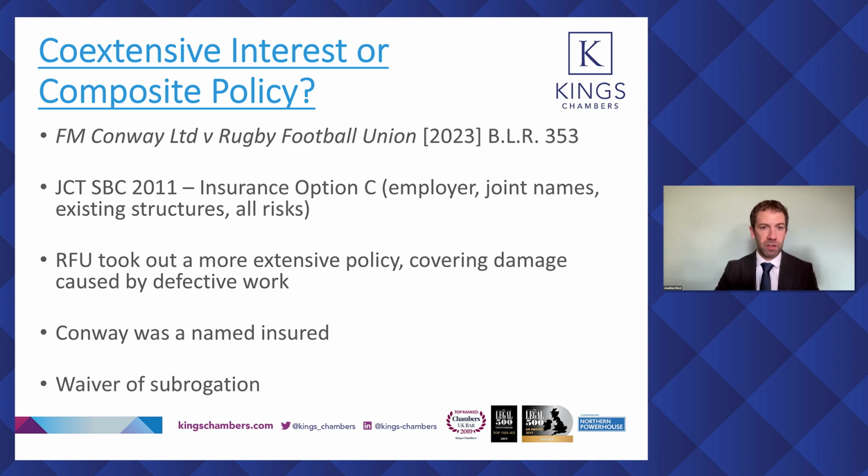RFU claimed on its policy of insurance. It recovered under the policy of insurance, and the insurer then went about bringing a subrogated claim in RFU's name against Conway, which is how the matter ended up, firstly in the TCC and then before the Court of Appeal.